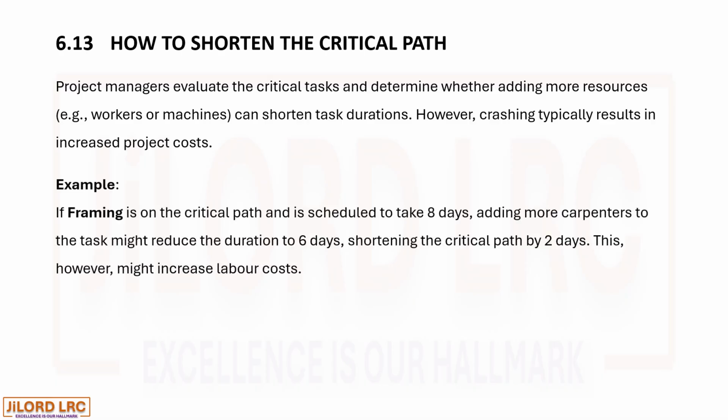For example, if framing is on the critical path and is scheduled to take 8 days, adding more carpenters to the task might reduce the duration to 6 days, shortening the critical path by 2 days. This, however, might increase labor costs.